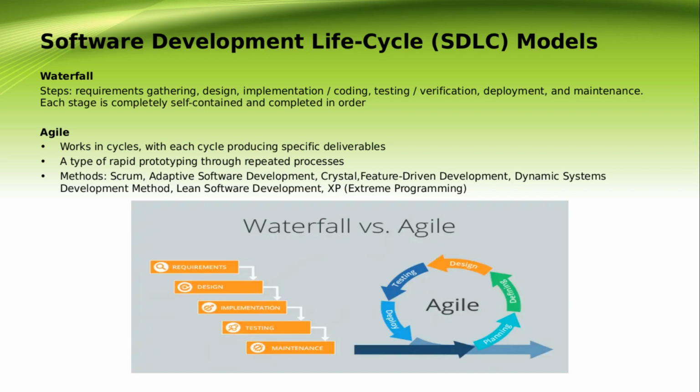So I give you a small exam tip, which will be very useful when you go for the exam. The main difference between Waterfall and Agile has to do with planning and adjustment. The Waterfall SDLC model is traditional. It starts with a defined set of requirements and a well-defined development plan, and it confines adjustment to the current development stage. The Agile SDLC model starts with less rigorous guidelines and allows for adjustment during the entire process.